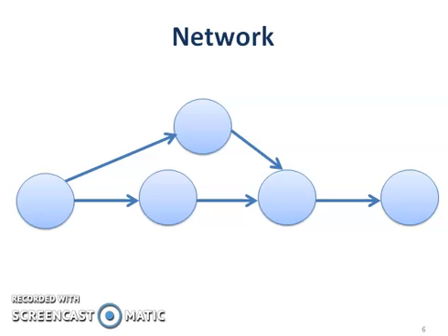This is how a network diagram will look. In a diagram, circle indicates an event, arrows indicate the activity. Arrows connect circles. Time taken by activity is indicated on the arrow. Node indicates finish of activity or beginning of the activity. The diagram is called network diagram. The arrow direction will show progress of activities.